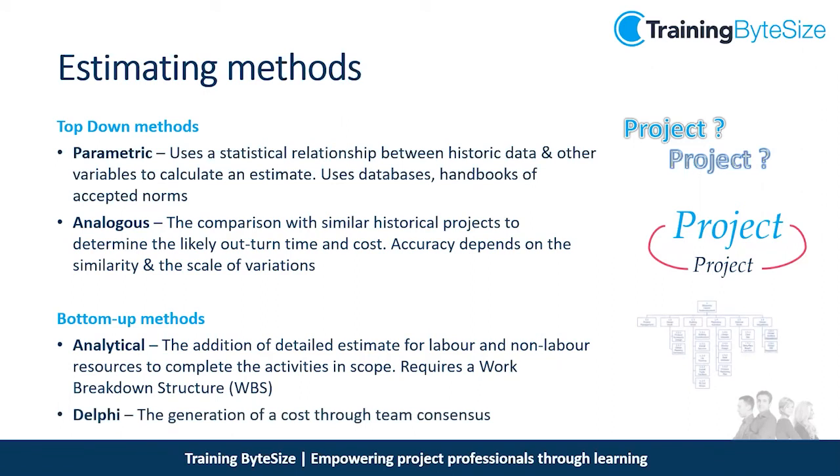You tend to bring in a group of experts who will then be split into smaller groups, who will discuss in their small groups, arrive at a consensus, then come back into their bigger group, and arrive at a consensus. Obviously, being a group of experts, it needs to be managed, have an agenda and have someone chairing it, but it allows a generation of a cost through a group of people using their experiences to arrive at a consensus and agreed cost.